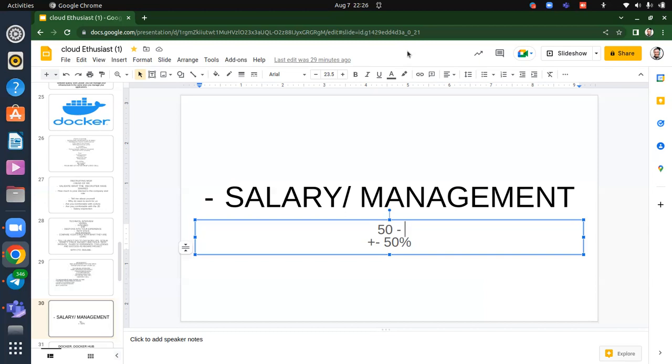So these are the daily tasks. What does a DevOps engineer do? First of all, when you wake up in the morning, you have your daily stand-up, which is 15 minutes. At the stand-up, you tell them what you've done and you hear the developers talk about the issues they are having. Then you go back to your Jira board. The Jira board is where we list all the things we want to do on a daily basis.